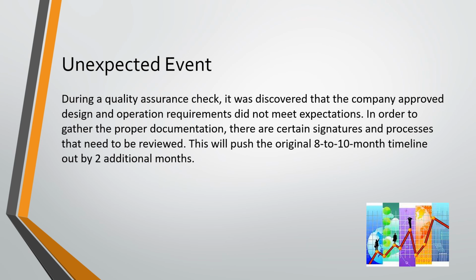In our project, we did have an unexpected event. There was a quality assurance check, and it was discovered that the company approved design and operation requirements didn't meet expectations, and in order to gather documentation, we had to push back the timeline by 2 months. So the biggest change was to our WBS. Originally, the WBS spanned over 9 months, but we had to change the timeline to 11. The other important thing is that we needed to inform the project sponsor of the timeline change immediately.